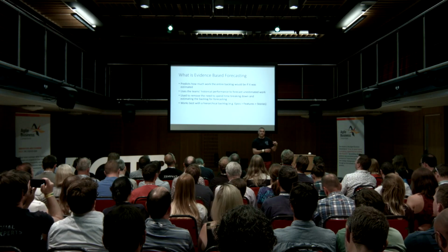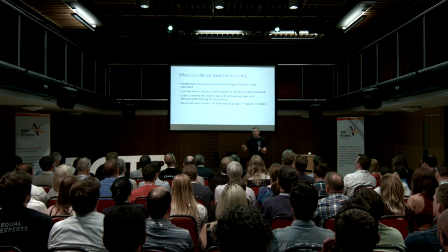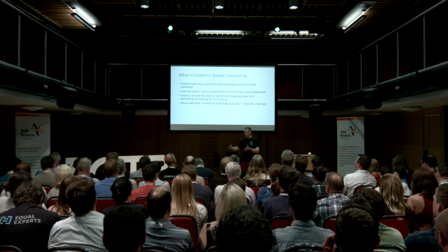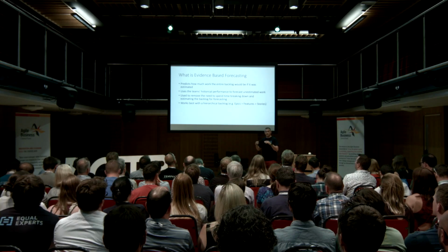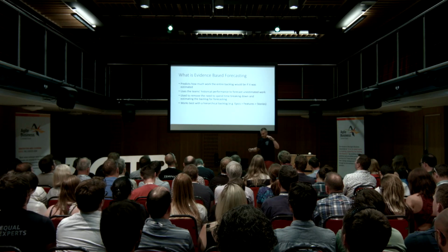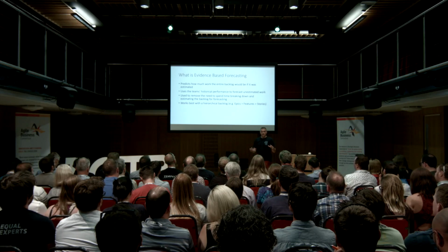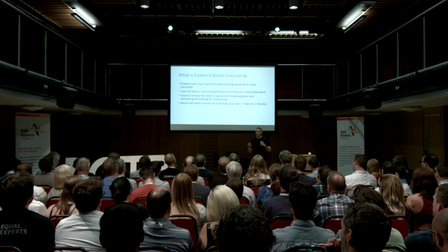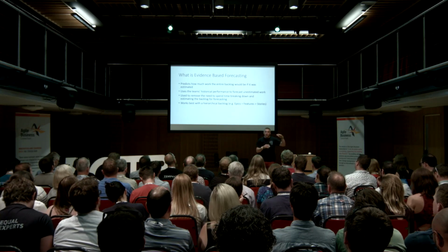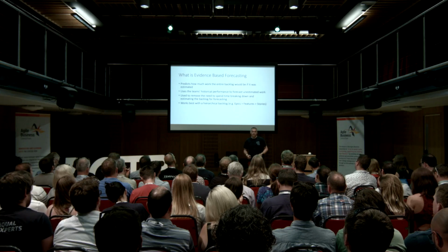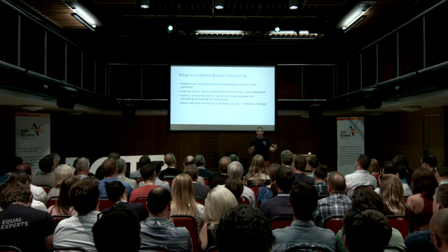So it starts off at the start of a piece of work not super accurate, but as you get further through your work, it should become more and more accurate. I find it works best with a hierarchical backlog, or a backlog with multiple levels in it. I tend to use 2 or 3 levels just because I find that's quite a good way of thinking about my backlog. I start with epic level features, break them down into features and then move into stories.